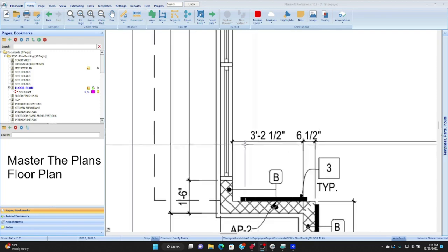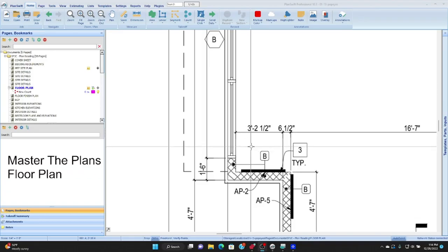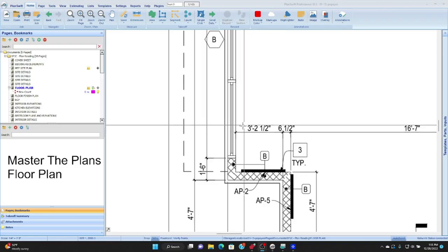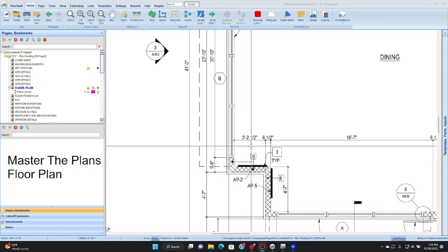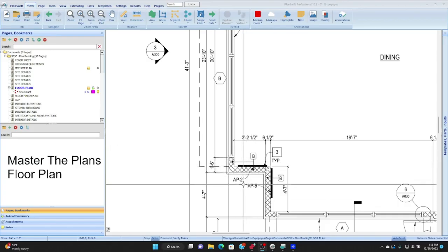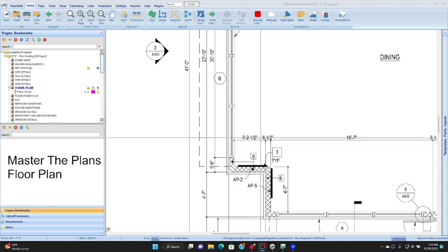Okay, and now, very specific to many floor plans, they're what we call highly dimensioned. Okay, and so again, we can use the dimensions on the floor plan. If we don't have digitized software to help us accurately measure lengths, we can use the measurements that are on a highly dimensioned plan. Dimension is a measurement, and so a good floor plan is going to have a lot of measurements there for you, so you can relate the wall lengths to the actual measurements that they give you.